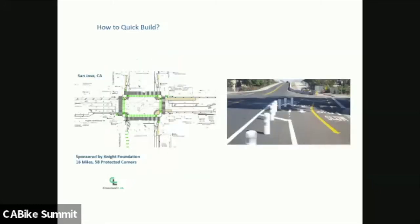So here's an example of a quick little detail just for San Jose. You can see the amount of level detail for one intersection. We built 58 corners in the downtown, 16 full protected intersections over 18 miles of corridors throughout downtown San Jose. This project was a great project. It was sponsored by the Knight Foundation to kind of help rush things really, really fast.